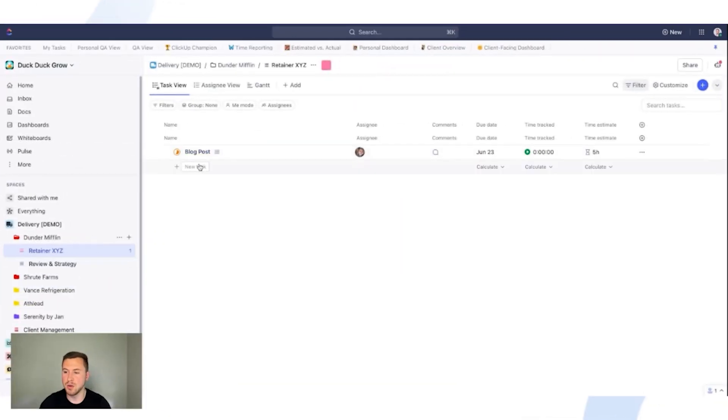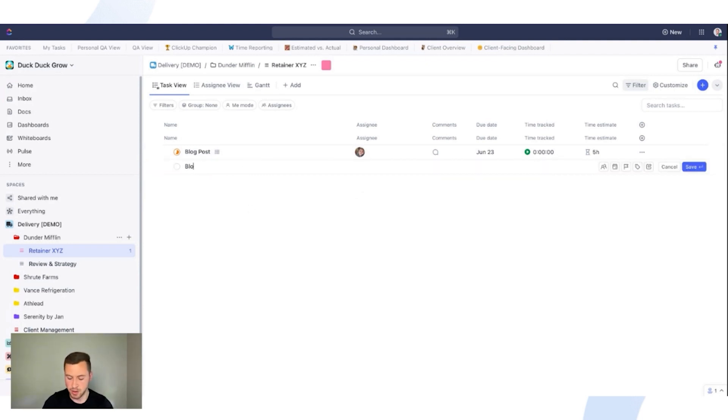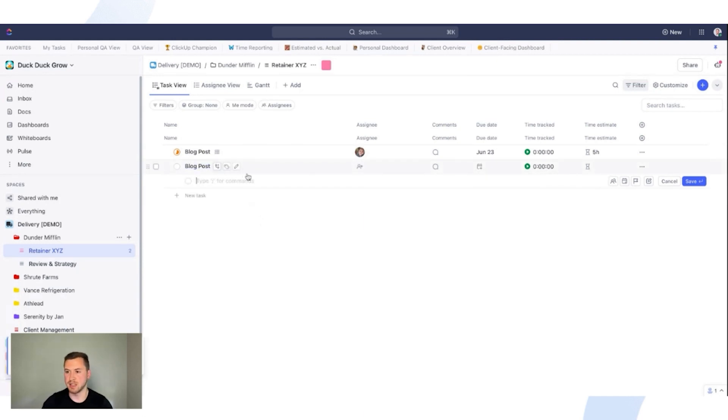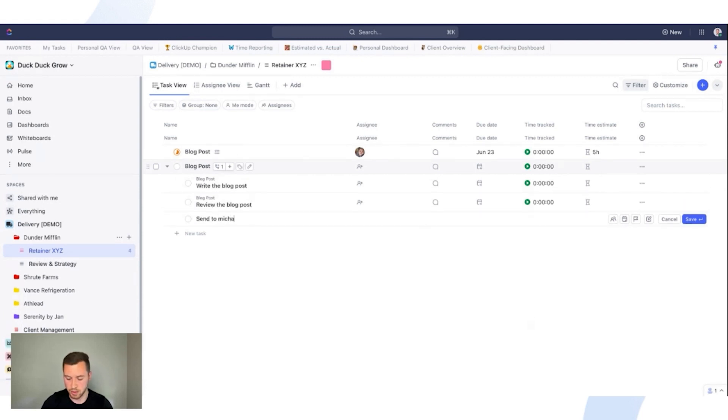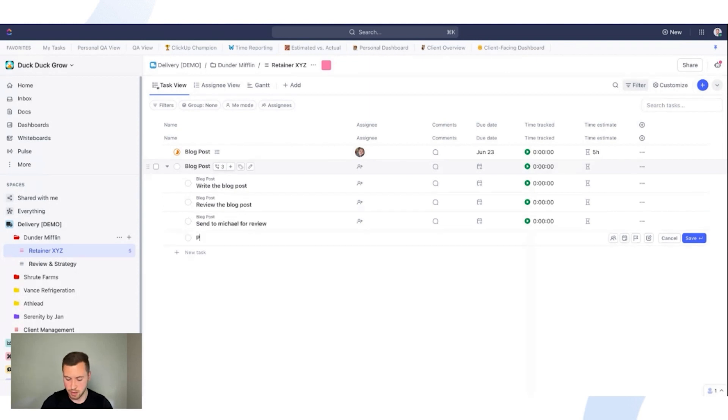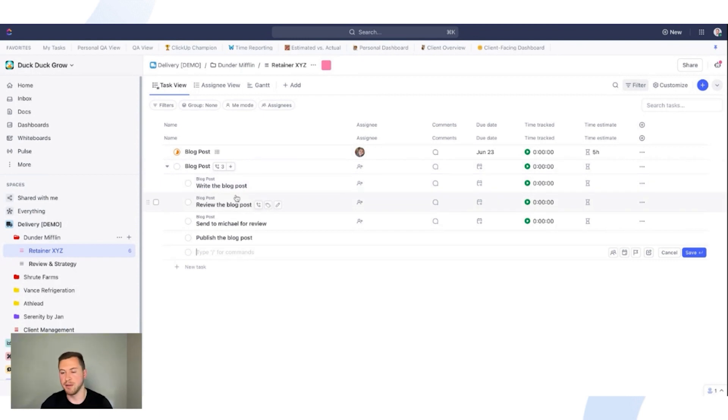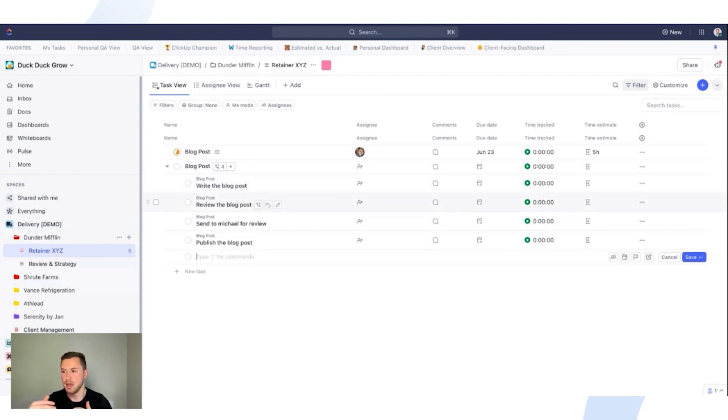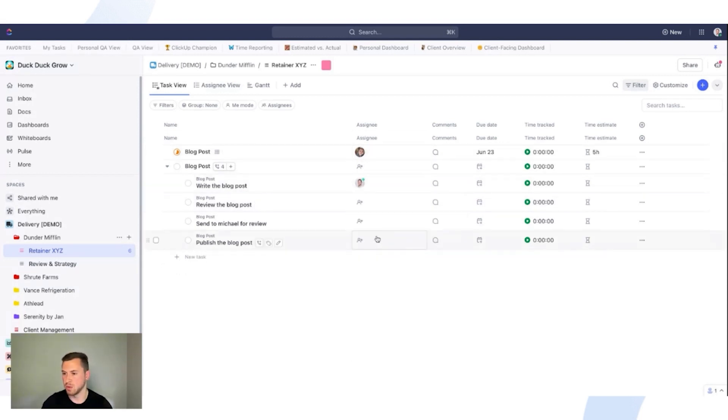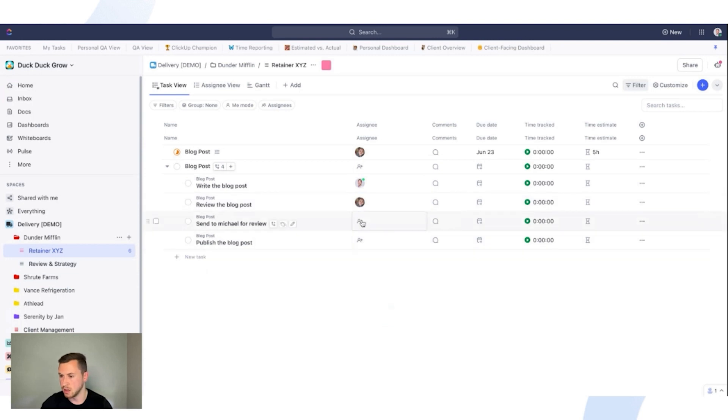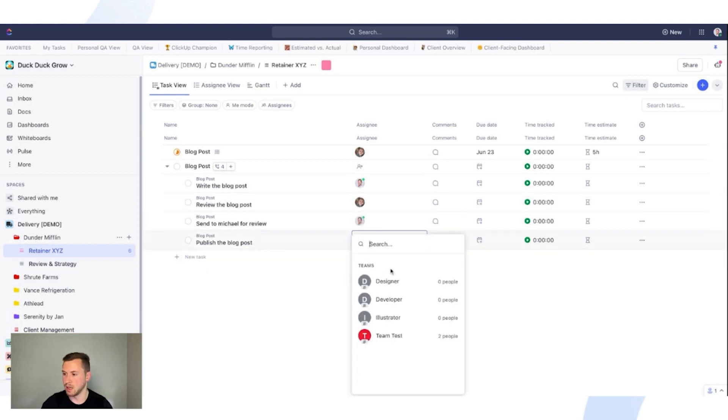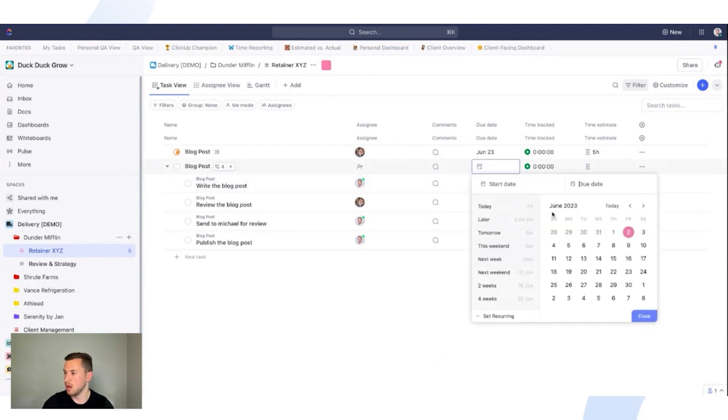Stage two is moving sort of the next level. And you just start with, again, Michael wants a blog post. We go here. But now you're like, okay, I can't really do it in the parent task. I'm going to start doing this in subtasks. So I do write the blog post just like that. I do review the blog post. Send to Michael for review and publish blog post. Again, if you have to do it every time, once you get multiple different clients and you're having to write out all of your subtasks and build everything in here. So now I have to come here and assign this work out. So I'm the one writing, reviewing it. It's going to be Ian. Send it to Michael. I'll do that. And then I'll also publish the post.